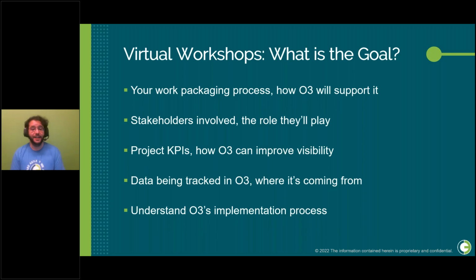And then there's the data. We want to understand a few different things here. The first being what data you want tracked in O3, where it is coming from, so if it's going to be migrated from any external systems, and who owns that data. Again, this is something we want to have clearly defined before configurations begin. This presents a huge roadblock if it's not handled early in the implementation.